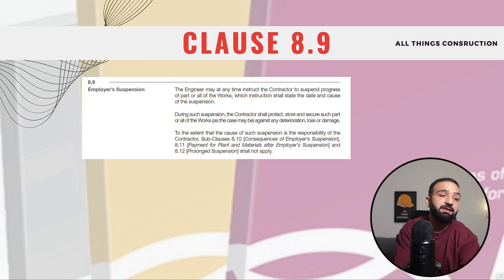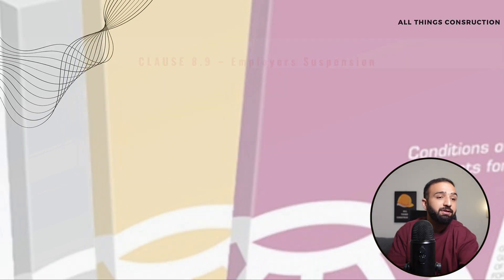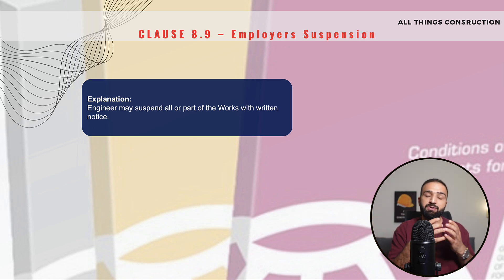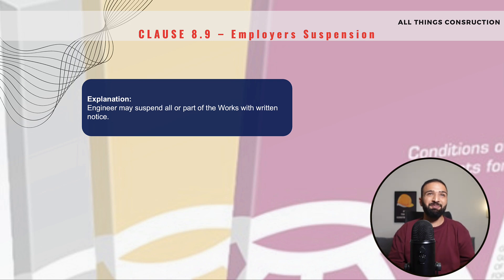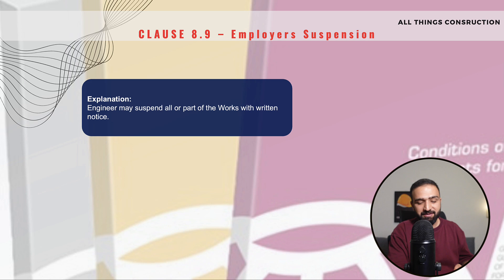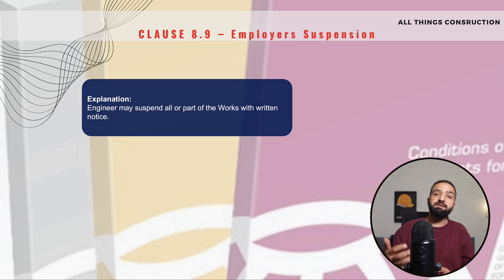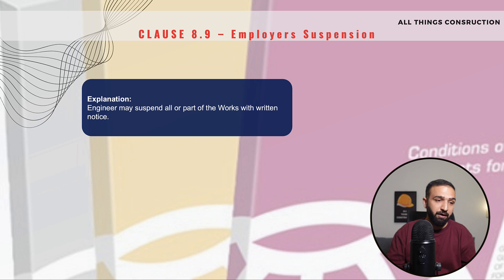Clause 8.9 is Employer's Suspension. What this clause basically means is that the engineer, upon the employer's direction, can instruct us contractors to suspend part of the works or in some cases all of the works. This can happen for various reasons — there can be budget issues where the employer suddenly does not have enough money, or the works undergo a major redesign.